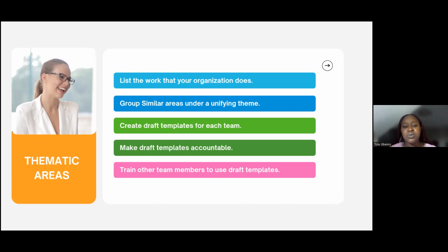Now, the next thing you do is you create a draft template for them. So for instance, for capacity building, you're going to be hosting a lot of events. You're going to need a lot of questionnaires. So you can create a dummy questionnaire and say, under section 1 for demographics, these are some feature questions that we would ask looking at demographics. And then you can say for section 2, these are some project-tailored questions. And for section 3, you can say this is related to maybe the technology or the mechanism that we are using to transmit this capacity building training to people.